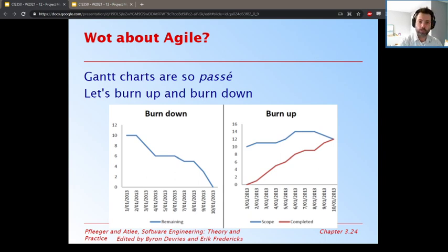We don't know with this perspective. All we know is that the number of remaining tasks remained constant. More than likely, either something happened that was very hard and it took us longer than we expected, or maybe this is even expected. Either it was really hard and we got stuck on it for a while, or we kept finishing tasks and kept adding new ones, so we had a net gain of 0, or it just took longer than expected.